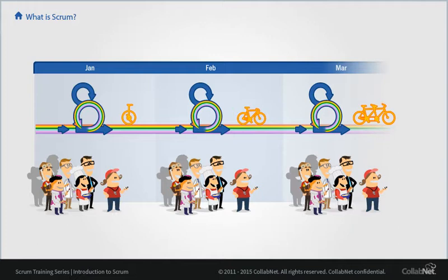Now instead of waiting for the end to start our testing, we'll start testing with our very first sprint. Instead of doing all the design up front, we'll do a bit of design every sprint until it becomes continuous design. We'll do small amounts of continuous redesign and refactoring to avoid technical debt. Every sprint combines all aspects of the work. A Scrum team should collaborate together instead of working in phases with handoffs.